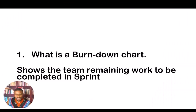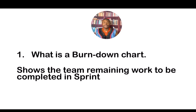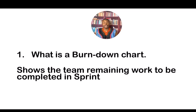I've prepared three slides for us to go through. Slide number one tells us what a burn down chart is — it shows the team the amount of work left to be completed in a given sprint. That work can be in story points for teams estimating in story points, or in hours for teams estimating their efforts in hours. A burn down chart gives you visibility as a team to see how you are progressing towards the sprint goal. I'll illustrate both formats in the upcoming slides.